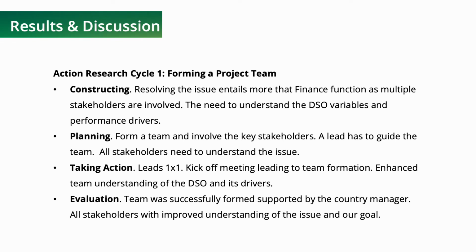During implementation, the first action research cycle focused on team formation. During the construction stage, the management realized that the finance function alone cannot solve the cash collection issue because it involves multiple stakeholders. All these stakeholders must understand the issue, the key variables and processes involved, and establish a common goal. In the planning stage, the management supported that a project team be formed and a project lead be appointed to guide the team. Incidentally, I was designated as a project lead, and thereafter I identified the key stakeholders that should be part of the team.